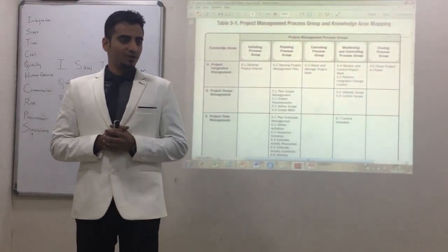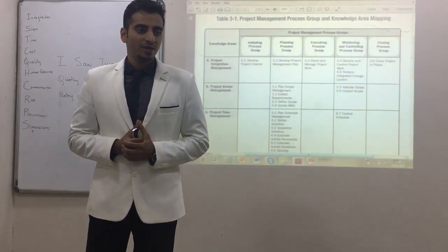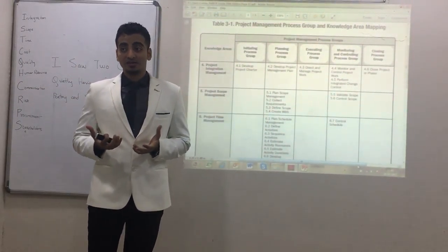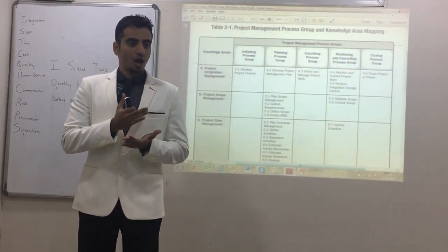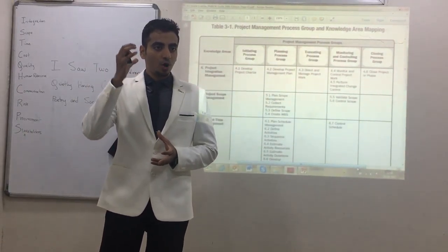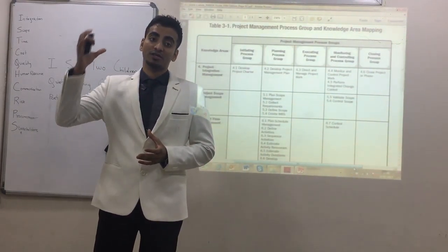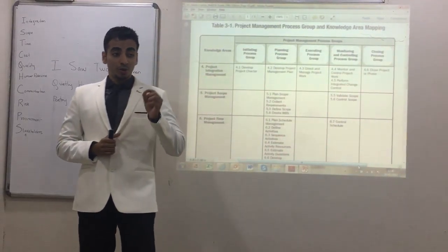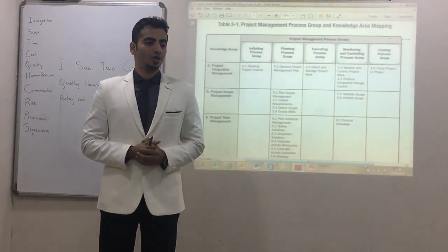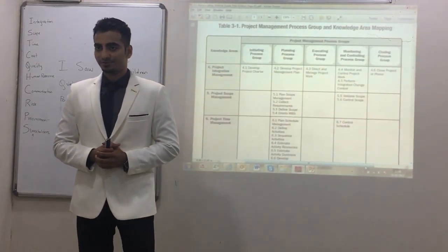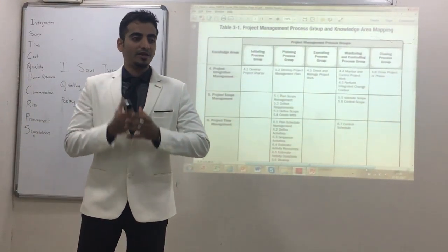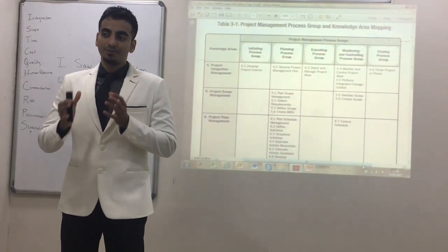Now what happens at the time of initiation? We have already seen in unit A, at the time of initiation we create a project charter. A project manager along with the sponsor creates the project charter. But the charter is authorized and approved only by the project sponsor. So he is the only one who can authorize this charter and give it to you, and you create your project management plan.